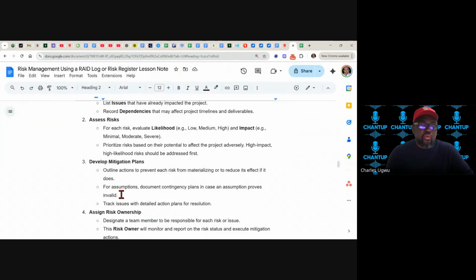If you are a very wise project manager, you are not going to plug the whole 10,000 into the project. As a wise man, you plan around 7,000 and then put 3,000 aside for a rainy day.